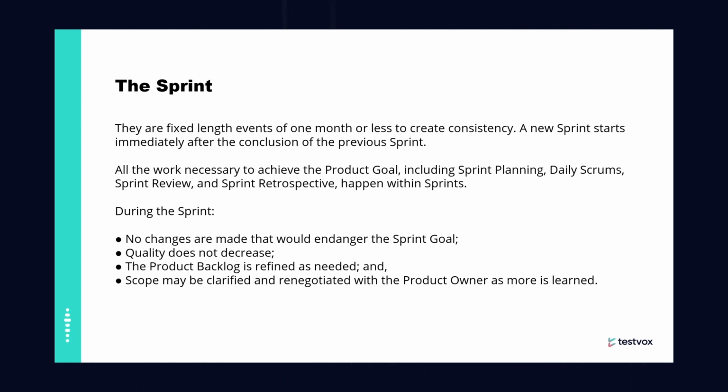Yeah. It is fine, but as I said, ideally based on the books, Scrum is not recommending anything rigid. Like Waterfall: if you're going to follow the Waterfall methodology, they have a certain set of guidelines stating this is the ideal duration, and you should follow it. But Scrum is not asking anybody to follow this. They're just recommending that the ideal duration is between 2 weeks to 4 weeks. But based on the project complexity, if a project follows 1 week, maybe too many activities are progressing in 1 week, and that's why they want to have it so frequently instead of 2 weeks or 4 weeks, right?